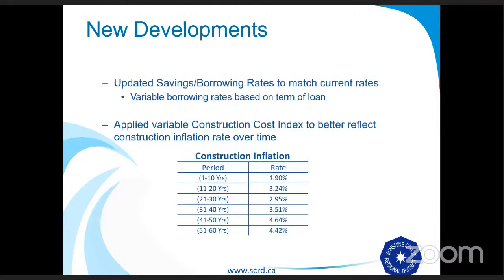As part of the annual review process, we've updated the savings and borrowing rates to match the current rates. We also introduced variable borrowing rates based on the expected term of the loan. This allowed us to look at the impact of a future loan being a 10-year loan or a 25-year loan and how that affected the capital model. One of the main concerns we heard in the past was that our inflationary index was too high. We went back through all the data and, to try to reduce that number, we've introduced a variable construction cost index. This pegs the amount of time in the future the expected work is to occur with an inflation rate that matches the historical rate, just to reduce any inflationary effects that are unnecessary where possible.